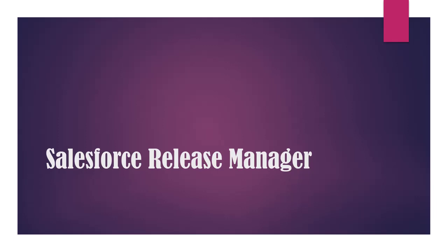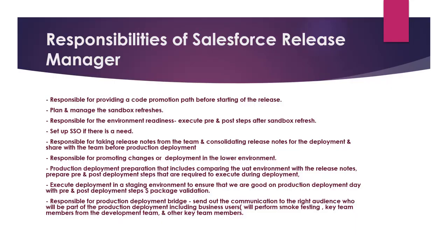So let's go and find out what responsibilities a Salesforce Release Manager performs. Here I have listed some of them. Basically, the person is responsible for providing a code promotion path before the start of the release, and will be planning and managing the sandbox refreshes, responsible for environment readiness that includes execution of pre and post steps after sandbox refresh.